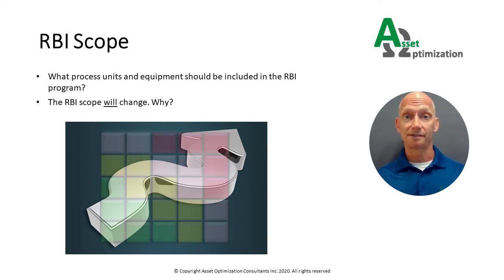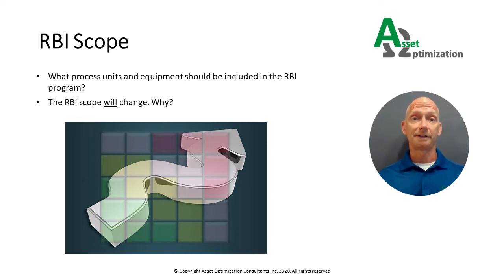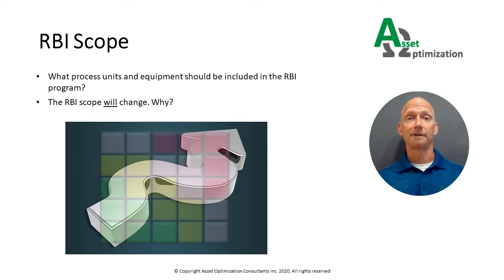This will include determining the process units, the equipment types, and the specific equipment items to be included. Your initial RBI scope will change, so be prepared to adjust your project plan accordingly. Some of the most common reasons that the scope will change include the initial equipment list or asset register may be inaccurate due to being out of date or equipment not being classified correctly. As the project progresses, the RBI team may choose to add additional covered processes. Also, equipment may be removed for various reasons where either the value of RBI cannot be realized or RBI is not allowed by regulations.